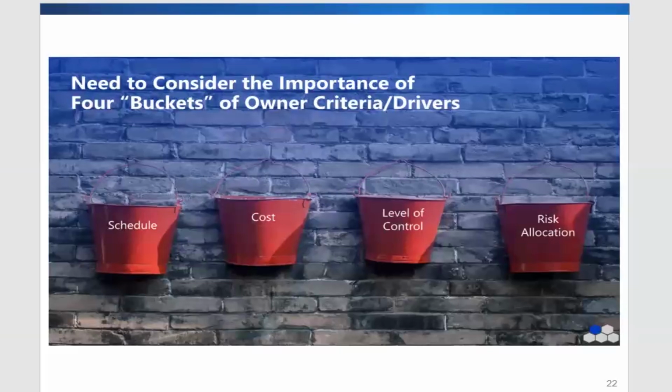So in this case, the major driver will be the schedule, that after 2 years, if you don't meet the schedule, there could be a daily fine which can go as high as $100,000 per day. So in this case, the client will pick the schedule as the major driver for this project. So this could vary in various circumstances depending on the needs of the client, right?